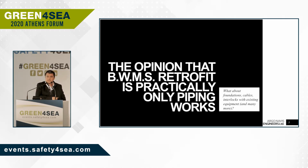One of the biggest mistakes that still exist, and we still receive such opinions from clients, is that ballast water treatment system retrofit is practically pipeworks. It's not. Definitely it's not. We have cases where some of our clients decided to install pipes 1 year ago. They have installed the pipes, they have installed the equipment. However, 1 year later, they are still trying to complete the installation because it's not only pipes. It's cables, it's foundation, it's interlocks, there are many more.